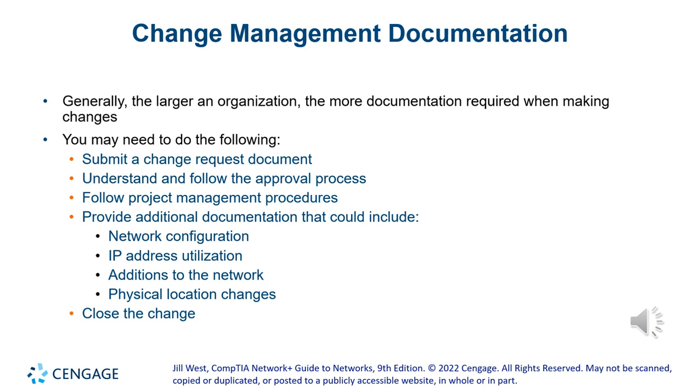Everybody knows. I notify the campuses, I notify directors, I notify everybody that would get involved or affected. I notify them ahead of time. Hey, this day we're going to be doing this upgrade or this change, and just to let you know, we might be down for 5 to 10 minutes. If I know I need to do a change where I'm going to disconnect the internet to the college, it's going to be down for about 30 seconds if everything works well.